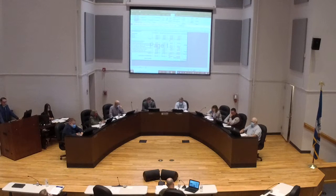This sheet that I put on the screen is a summary of all the projects that we've just presented. You've already taken action on the LED field lights item. I'm indicating 2 numbers. The estimated construction cost is what we use for funds available. That's important for bidding purposes, but for your purpose, you want to look at the project allocation. And just as a starting point for discussion, I put in the projects that Mr. Haney felt were priority here in year 1. And I moved right into event parking and baseball park in the future. And I added the half practice field at North Hazel.